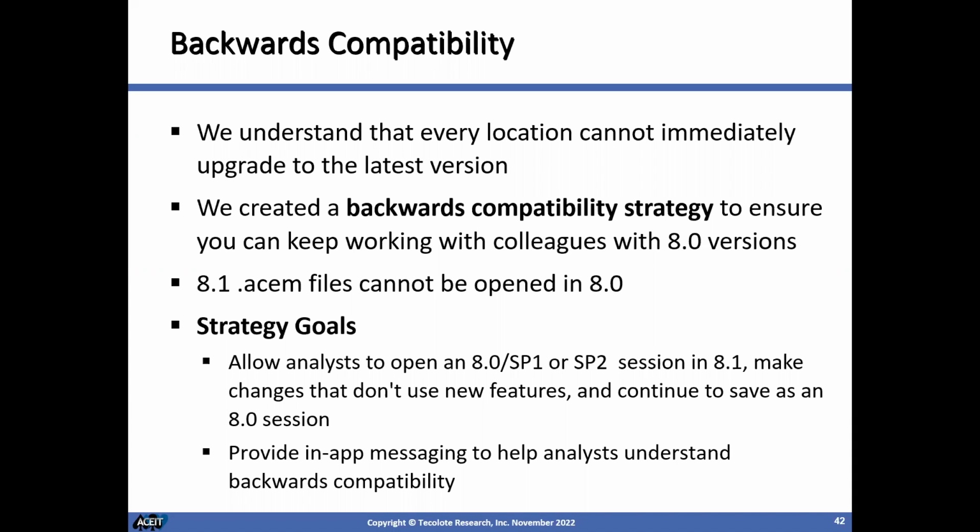And then also allow them, if they want to stay within the ability of being able to go back to that previous version, we are messaging for them when they are about to use a feature that's going to make it so that they can't open the file in 8.0 anymore. And we also have the ability to work in 8.1 and save back to 8.0 service pack 2 or 8.0 service pack 1.